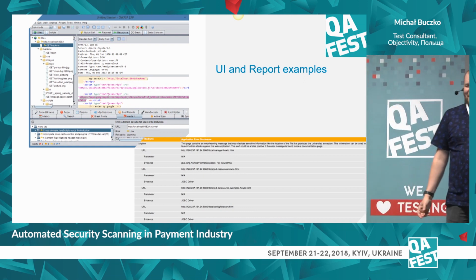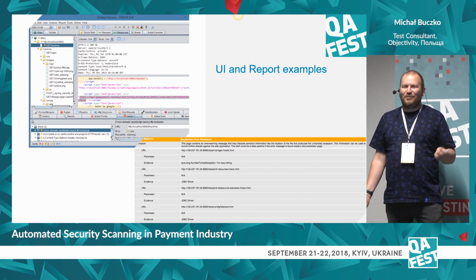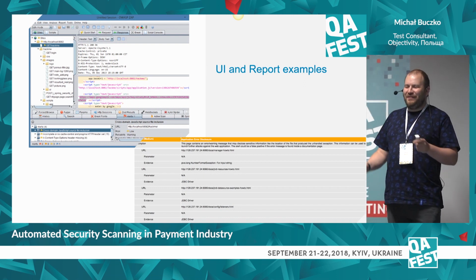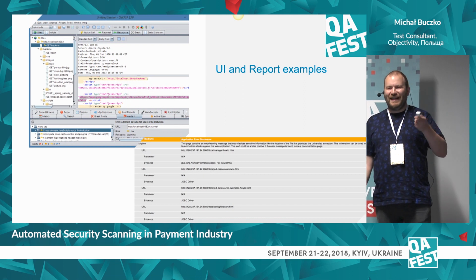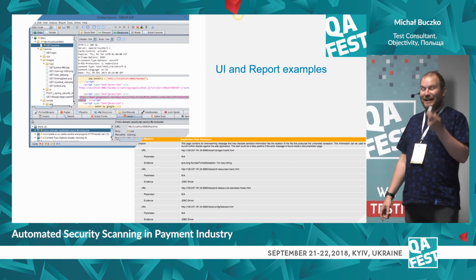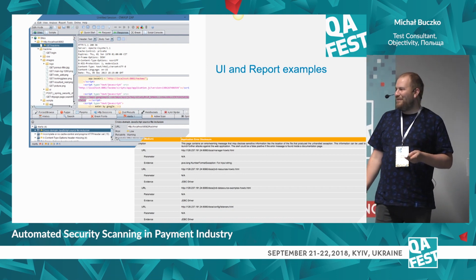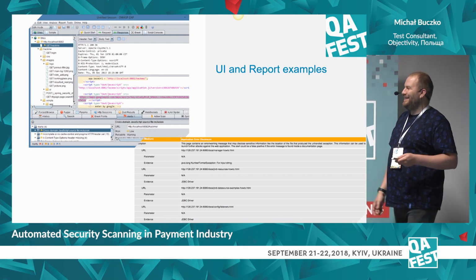And that was a learning point. So then there was a 5 why analysis, why did it happen, and all the other stuff. And we divided it into 2 different sessions. The first session was why the tester didn't have a dedicated security testing sandbox to test on. And the second one was why everybody was feeling that they were pretty secure and then lost all the data.